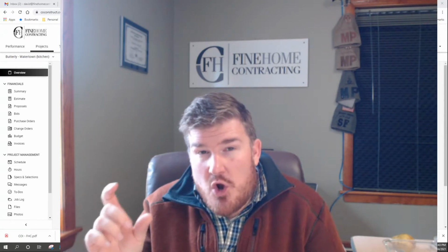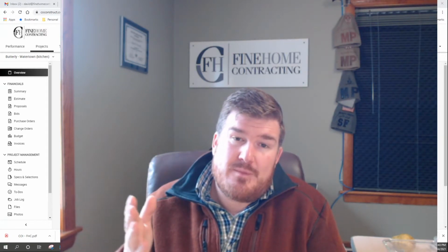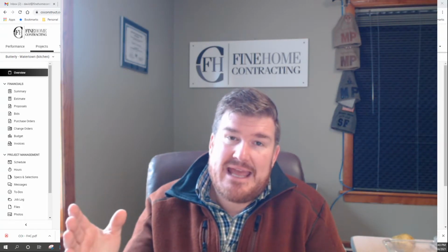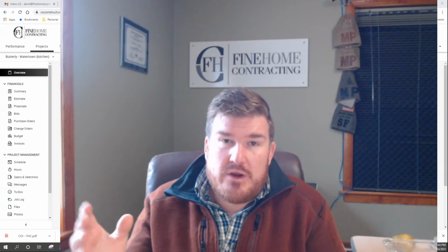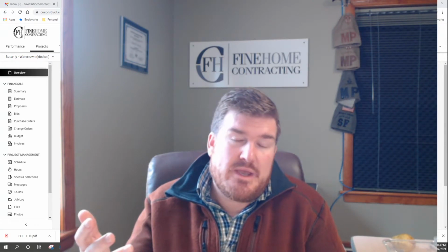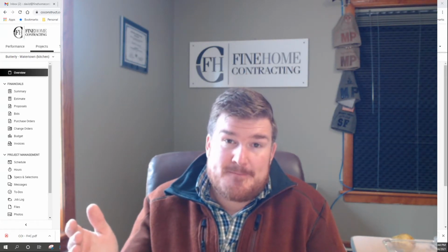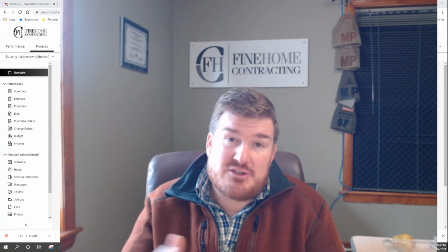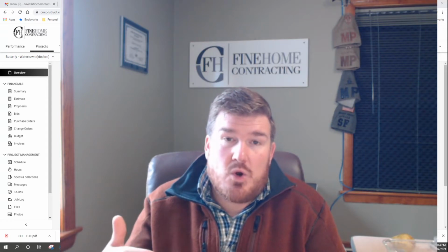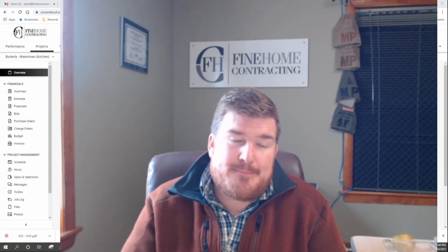The key thing though is that you've collected enough money so that the last invoice is always 5%. So why do you want that? Well, you don't ever want to go through the whole project and towards the very end somebody's holding up $30 or $40 or $50,000 on a project for a punch list item, right? Obviously there's a cash flow issue on that, but also there's a huge liability. Typically most of that 50,000 is what we want to pay our subcontractors out of so they're made whole. They've done the work. So you want to have that collected.